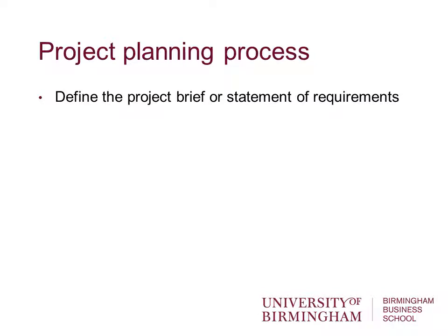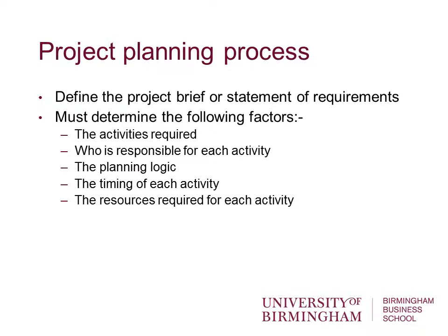So what's the process involved? Designing or defining the project brief or statement of requirements. This has to determine a number of things. What activities are required? What actually has to be done? Who's going to be responsible for delivering each activity? What's the planning logic? In other words, what has to come first? What comes next? What aspects of the project have to be delivered before other aspects can be delivered?